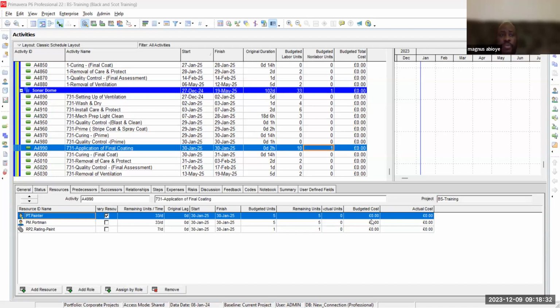I'll give you an example. We don't want to present to the client what 1 hour represents per cost because the client quantity surveyor or the client commercial man may say, so you are charging us 65 pounds per hour and you are putting 30 pounds per hour as your budget cost.